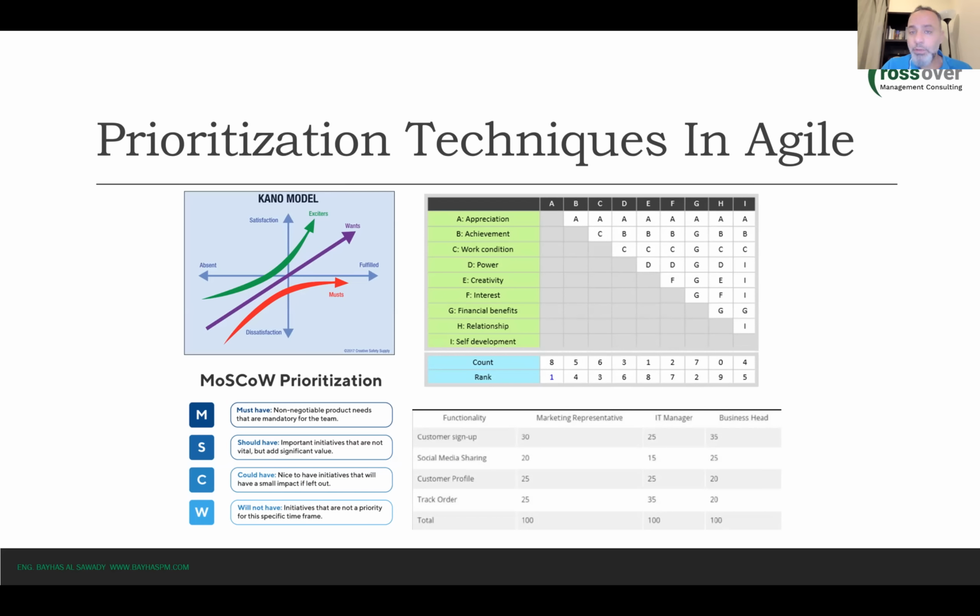We call these components at the last level of decomposition work packages. We also identified some control accounts and some planning packages, right? And we attached to that a WBS dictionary document that also describes in more details the components of the WBS. Now, this is the way that we use to plan for scope in traditional approaches.